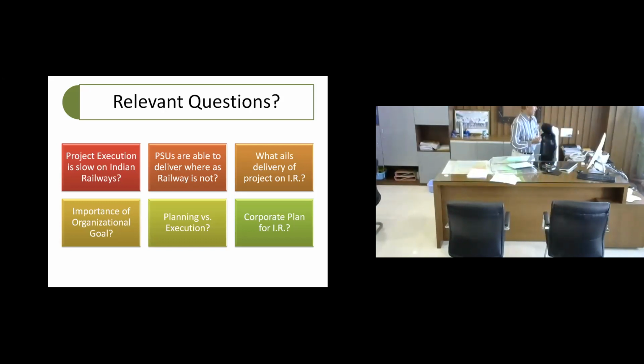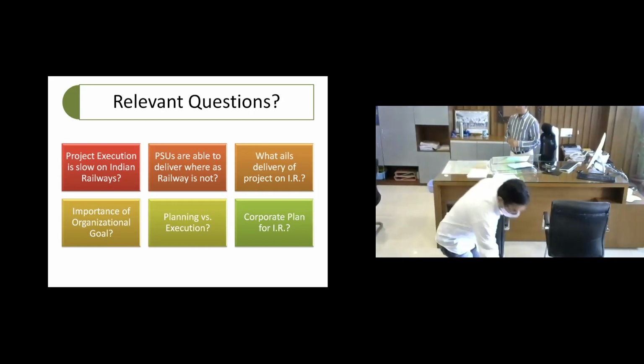And when I say planning, it includes site investigation, conceptual planning, your design, site hurdles, your legal hurdles, whatever you are likely to encounter, you must account for in the beginning of the project. And a substantial portion of the project, like if we have a 6 year duration, roughly one third should be devoted to planning, investigation, design, and anticipating all the hurdles that you are likely to encounter when you move to site. So planning should be given due importance.